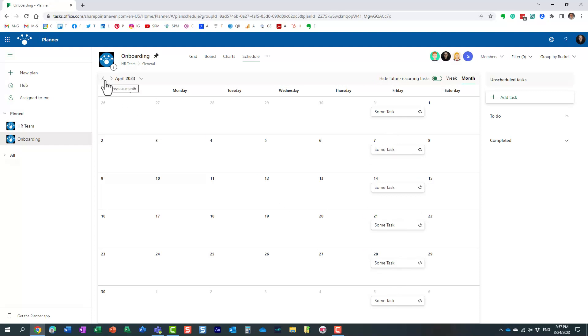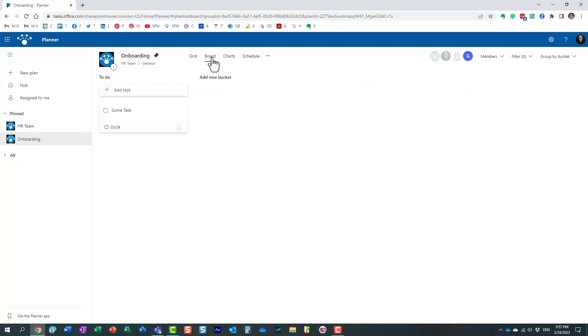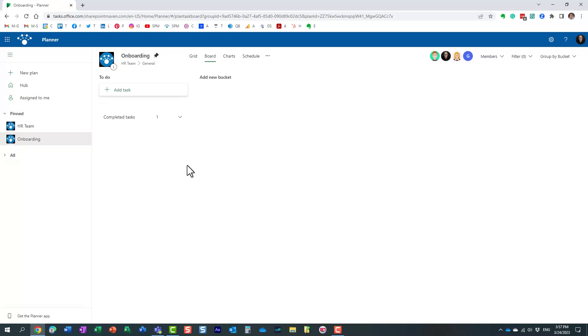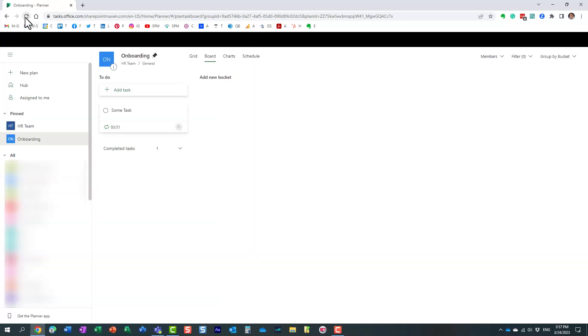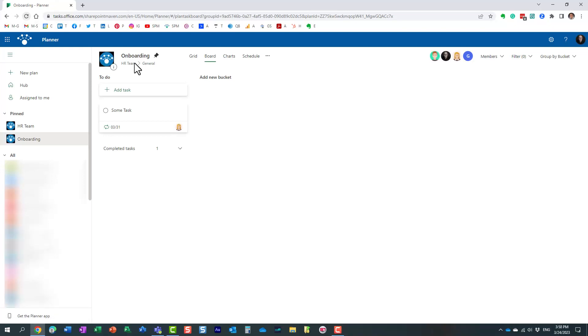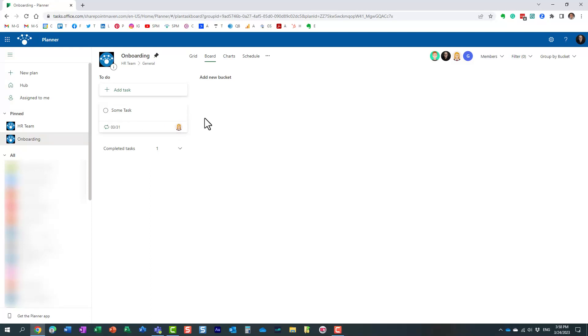Now, let's say, let's pretend I'm Mary, and I'm ready to complete the task. So I just obviously complete the task. However, let me refresh my screen. It's not obvious right away, but let me refresh my screen, and let's see what happened. Look at this. Mary completed just when she clicked on this checkbox. She pretty much just completed the next instance.